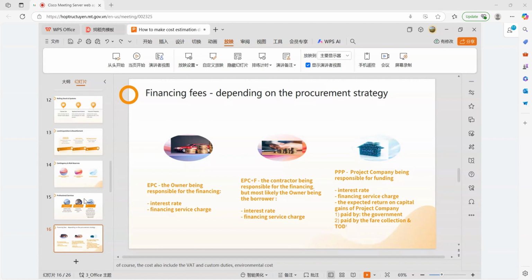Now, what we are looking at are the steps of doing parametric estimating. Step one is to select key parameters. What is highlighted in red is the example I would like to take, for example, the mountain surcharge, environmental mitigation, and system complexity.